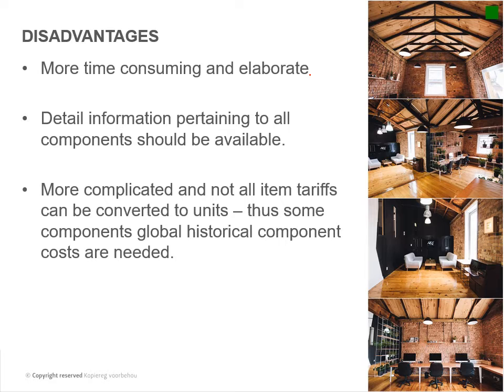But what is nice about this is you can actually get new rates. For instance, you can go to builders and get the cost of a toilet, and add your installation cost, add your profit, and so on.